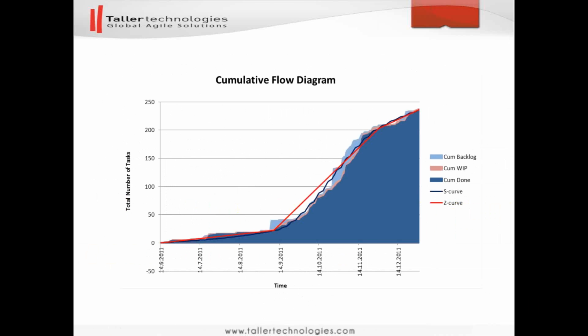This is a cumulative flow diagram from a real project. It visualizes the rate at which the work items were delivered. So it's actually historical data for us. On the x-axis, we have the project time in days. On the y-axis, we have the number of work items delivered each day. We will be using the data behind this diagram in order to predict delivery date for future projects.